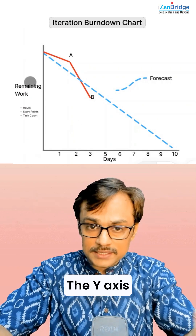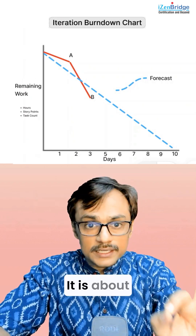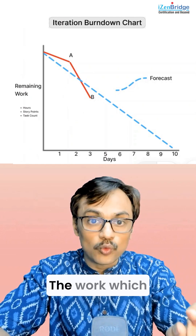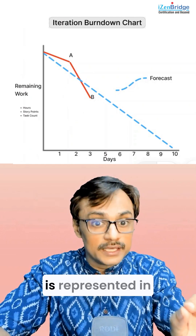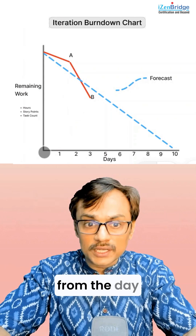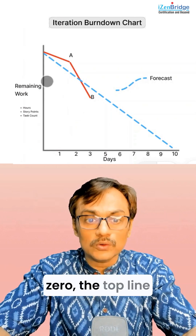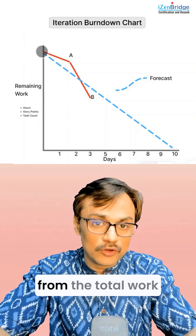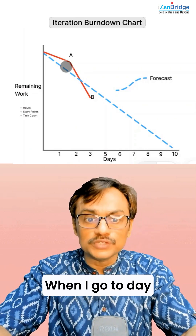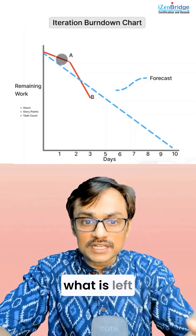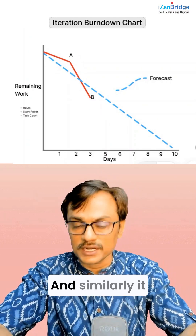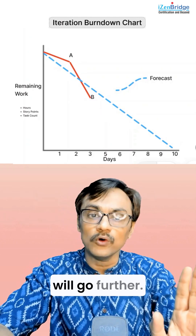The y-axis is important — it represents remaining work. Be very clear: the work which is remaining is shown on the y-axis. Starting from day zero, the top line begins at the total work in an iteration. As we move to day one, day two, day three, we look at what work is left after each day is over, and similarly it continues further.